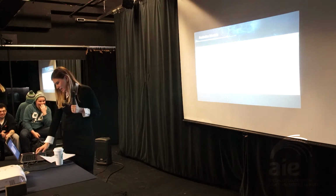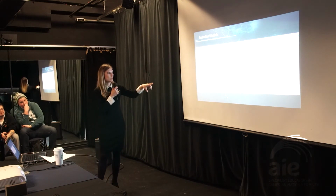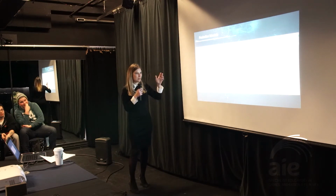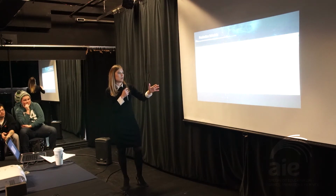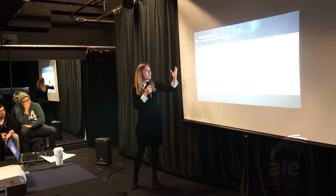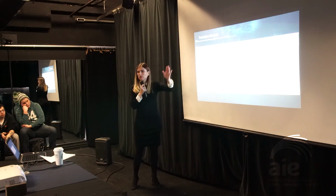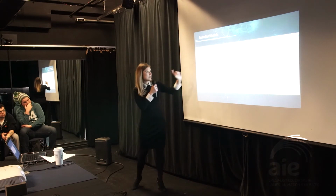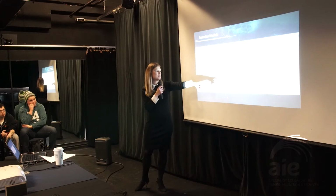A little note on production, since we touched on that subject. This is how we do production schedule. There's agile and so on, but we do a very simple table where we do micro milestones. So alpha is broken down into about 10 micro milestones. And that's how we know that we're going to get there eventually. We set a deadline for each micro milestone, and then when we pass it, we put a reality date.